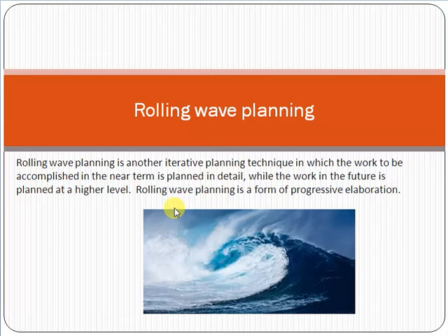Once the planning phase is completed and you reach the development phase, which is now your current phase, you do detailed planning for the development, like how many resources are required, how you do the development, how you do the programming, and so on. The detailed planning of development you will do when you reach there.